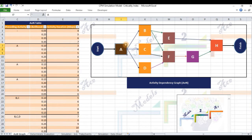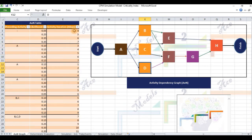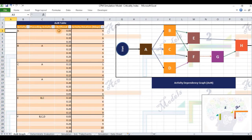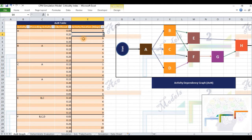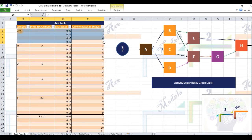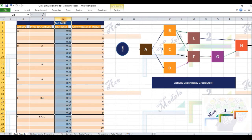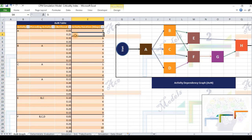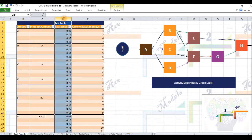Activities are depicted on the nodes of the graph using colored boxes. The duration of each activity is not a fixed predetermined number of days. Rather, we have a range of likely values mapped in column E, the last column in the AON table against the corresponding activity. Each possible duration value has a corresponding probability of occurrence indicating its likelihood. These are specified in column D, the third column in the AON table.